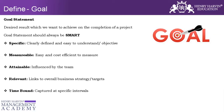Always remember, the goal statement should always start with a verb — like 'to improve,' 'to reduce,' 'to increase,' 'to eliminate.' A perfect goal statement would be: 'To improve the attrition percentage of the operations department from 15% to 10% by 31st December 2020.' If it meets the Specific, Measurable, Attainable, Relevant, and Time-bound components, then it's a SMART goal statement.